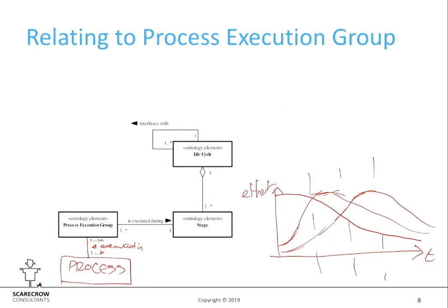That's why most modern standards like 15288, and even what the MOD does with CADMID, have gone away from having stages called requirements, analysis, design, to stages called conception, development, because they're acknowledging that in the conception stage you're not purely just doing requirements.